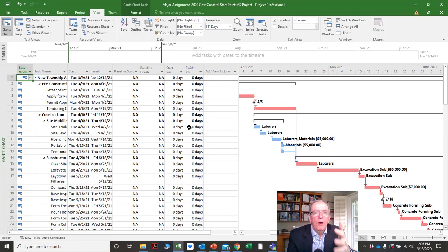It's very helpful, scheduling software, that you have a plan, then you measure where you are. And then once you see where you are, the next step is, well, how do we get back on track? What do we got to do? Do we have to work weekends? Do we have to bring in more resources? Or do we have to tell the client the project's going to be delayed? At least you have that information, and it's accurate information once you've updated, to then start figuring out how you want to proceed on your project.